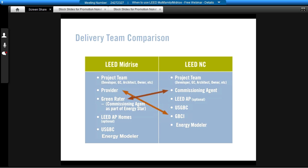We do a blower door test on the residential units to look at unit compartmentalization, or how well air sealed the units are from one another, which you may have run into if you've ever done a LEED EBOM project on a residential building. That's required for testing to make sure that there's minimal smoke transfer between units. But we're doing that also to test the leakage to the outdoors as well. And we're not necessarily commissioning mechanical equipment like you would traditionally have in the LEED NC process.